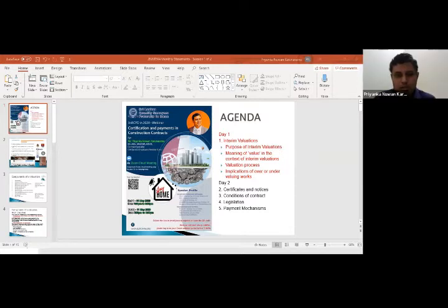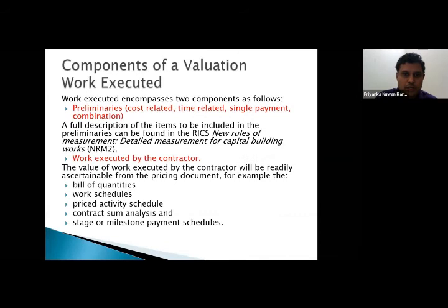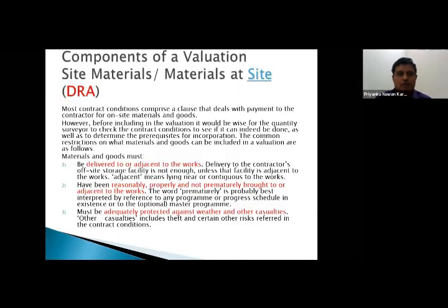Yes. Now, why I mentioned this one is, this is very important in identifying the word site when you are talking about materials at site, right? Because you might have seen some of the materials which are being procured for a particular project dumped outside the perimeter of the site. So you cannot call it materials at site, because you are defining the boundaries as indicated within that particular video. You have to define the site.